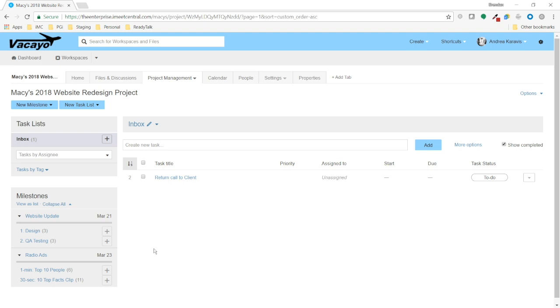I also have a radio ad that I'm working on that's due on March 23rd. And we have 2 radio ads that we need to put together. One is a 1-minute and one is a 30-second radio ad. I've decided to group both of those under a single milestone because they're both due on March 23rd. So you'll see that there are 2 different theories of usage here. One of them is a sequential task list, like the website update. First we're going to do design, then we're going to do QA testing. And another use case here where we have 2 task lists for 2 different radio ads that both need to be completed by March 23rd.